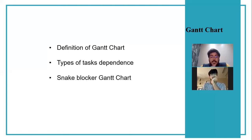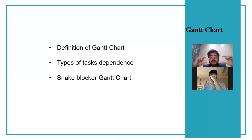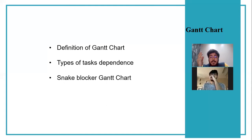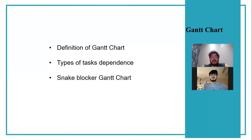One of the greatest things about Gantt charts is that they are extremely visual. On the left side of a Gantt chart, you will find a list of tasks necessary for the project. At the top, you will find the time scale. Each task is represented by a bar whose length represents the duration of the task. Each bar is also labeled with the title of the activity and any relevant information that will help carry it to completion.